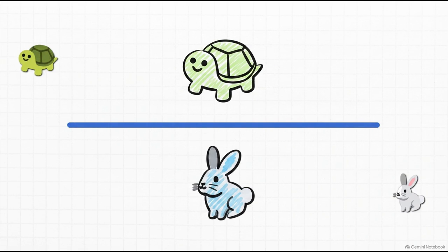You have this ideal trend line drawing a path to zero. If your actual remaining work line sits above that ideal line, you've just diagnosed that your team is behind. But if the line dips below the ideal path, your team is ahead of schedule. It is an instant, powerful daily health check to see if your sprint commitment is on track.